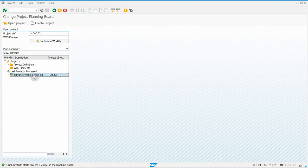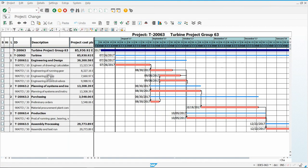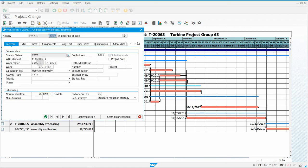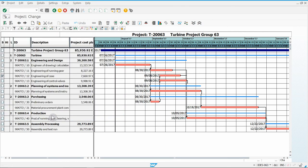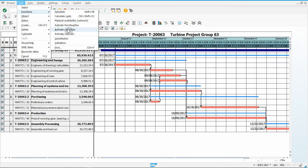You should already have your project created, so hop into yours. We're going to change the activity called Engineering of Case. Double-click anywhere on it. Go to where it says Work Center, type in 2700, and then click the green checkmark. Then Select All, Edit, Functions, and Activate Capacities.